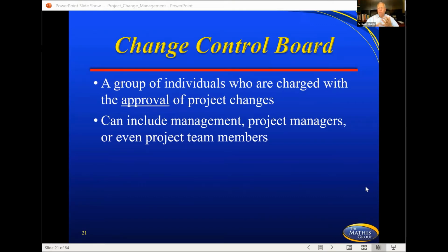Every change order should be looked at from money, also from a time period, and that should be given back to the board, that there's going to be an impact to the money and to the time period. Once again, because you can't just keep packing more and more stuff into that same time period and for the same amount of money. That's not going to work like that.